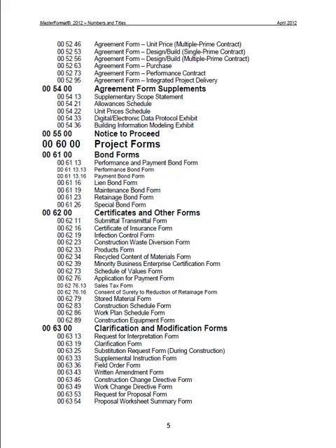Anytime a contractor works for the University of Maine, for instance, they are required to carry a bond, which means they are insured should they blow up, go bankrupt, whatever happens to them, the insurance company would step in and finish the project. It's not something either party really wants to deal with because it never comes out good. But we do require some protection when we hire a contractor to make sure that they are insurable, at least, that they have shown a track record of work that indicates that they can do the work and have done it in the past.